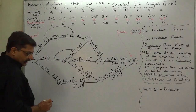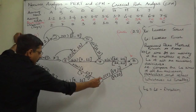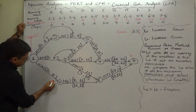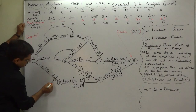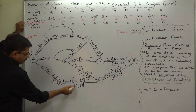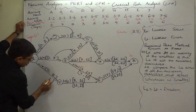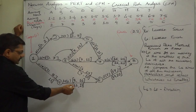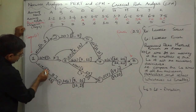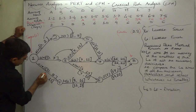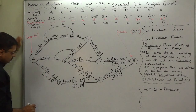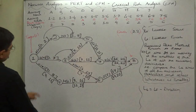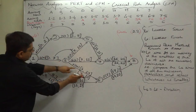In case of H, there is only one predecessor C. So for C, the latest finish will be 11 - that is the latest start of its successor H. And 11 minus 8 = 3 will be the latest start time for C.